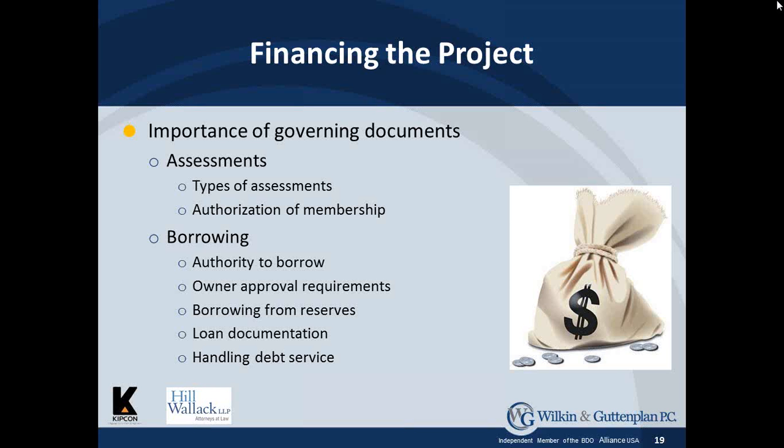The borrowing needs to be integrated into the replacement schedule for the community to ensure that funds are available when needed for replacement projects. In other words, the amount of the loan and repayment schedule should be coordinated with the association's overall replacement schedule so that the fund is replenished when you need it. Remember, whenever a capital project is contemplated, new useful lives begin for the affected components.